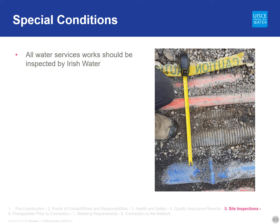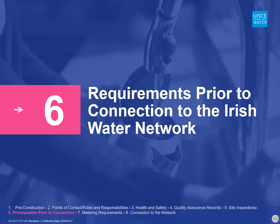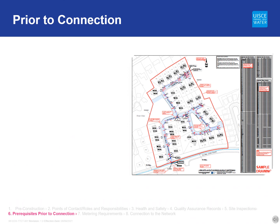The construction of all water services on self-lay developments must be inspected by Irish Water. Any works that have been constructed but not inspected by Irish Water will be subject to special conditions, which may include trial holes, slit trenches, and testing. Non-compliant work will require remediation by the developer to comply with Irish Water requirements. Before connection to the network, the developer must submit the final documentation and accompany the field engineer while they conduct the walk-off inspection. The developer is required to submit all final documentation as outlined in section 1.7 of the Water Codes of Practice and section 1.8 of the Wastewater Codes of Practice to the field engineer for review. A checklist outlining the minimum requirements for as-constructed drawings is included on the USB stick issued with each connection offer.